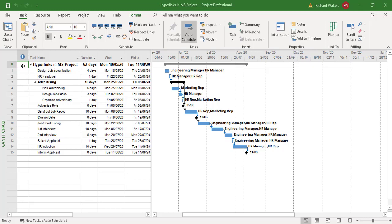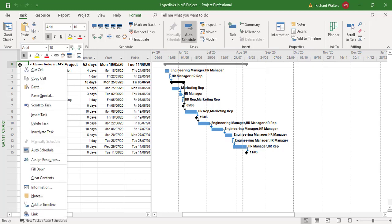So I'm going to start off at Project Summary Task level, so with me being in the indicator column, the I column, in line with the Project Summary Task, I can now right click, link down the bottom, and I can link this to a folder structure or a file.